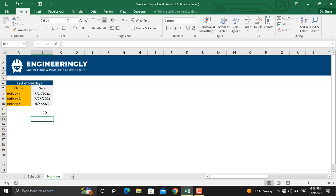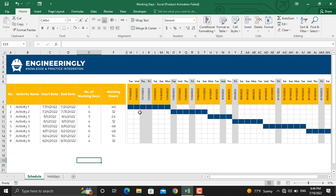In the holidays sheet, I have a list of holidays which will come throughout this project's lifecycle, so they should be excluded from the project's working days in order to have the right amount of estimation for the duration of the project, the start and end dates, so that we can assign resources as required for the project.